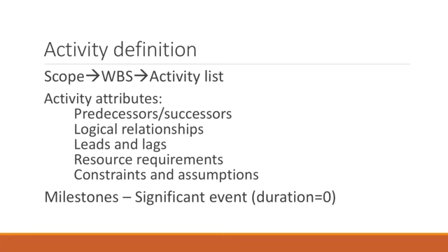When we're talking about milestones, there's a particularity about milestones in here. Every time that we think about milestones, those are significant events that happen within your project. But what makes it so unique is that there's no duration for those particular events. I'm not saying that there's no duration in order to get to the milestone, but once you have reached that milestone, that significant event, and you are trying to figure out how much that's going to take, the creation of the event in itself is the milestone. So when we're trying to figure out how long it's going to take for that particular situation to happen, you have nothing to worry about because that's not going to take any particular time.